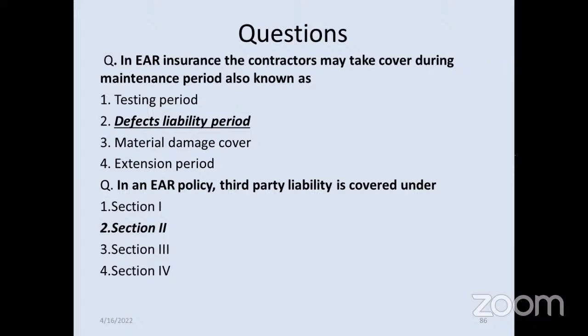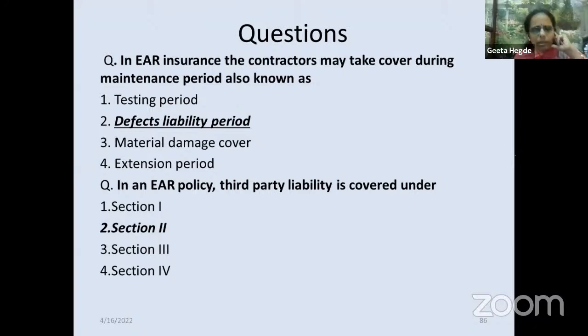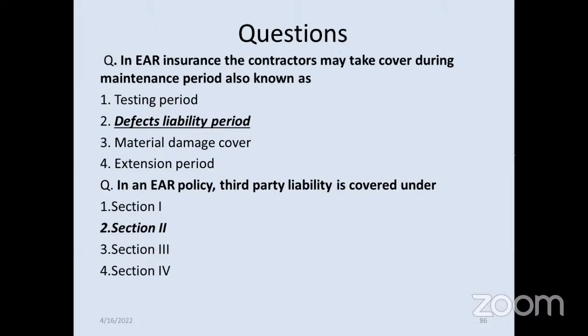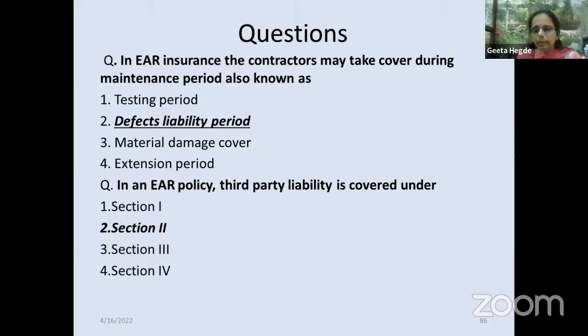So that means if the delay is for 20 days, then the first 14 days will not be counted. Yes. We will get only for the remaining 6 days. Yes, for the remaining days. Okay, we'll share all this. उसके बाद आप you can even raise your questions in the group also.